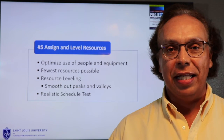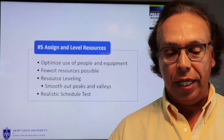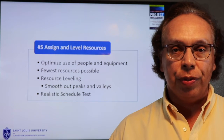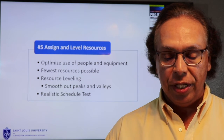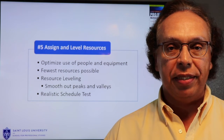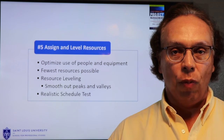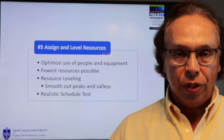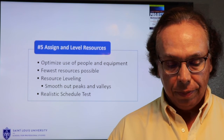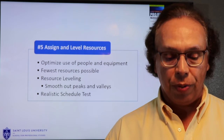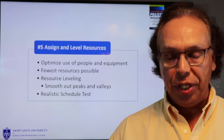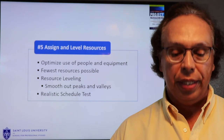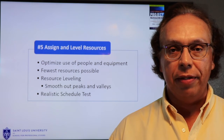Step five is to assign and level resources. You want to optimize the use of people and equipment, using the fewest resources possible to keep costs low. Project managers use a process called resource leveling — we start with an initial schedule and smooth out the peaks and valleys to make sure nobody's working more than 40 hours a week. We also want to do a realistic schedule test, which we call the sniff test. You can do this by doing schedule reviews with experts or your team, and then baseline the schedule with your project sponsor. Make sure resources know when they are needed and when they will roll off the project. The same goes for equipment and supplies — try to get them on site in advance if you can.